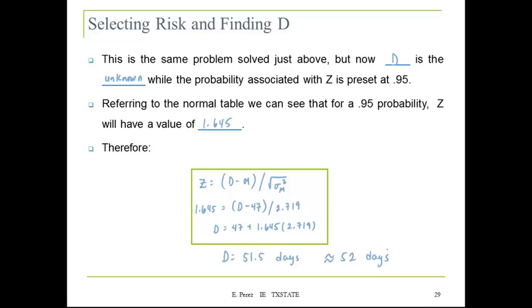So we just added 2 days and changed our confidence from 83 to 95. Yes, to go from 83 to 95, you need to add a couple of days. Oh yeah, for sure. And then again, you want to make sure that you are satisfying the client, but you don't want to compromise your work at the same time. So you have to find that balance.